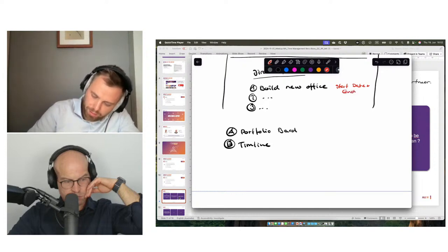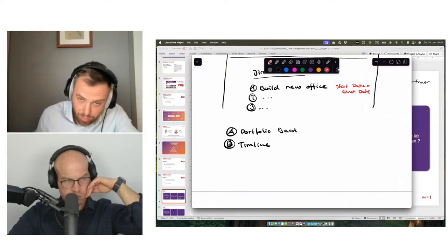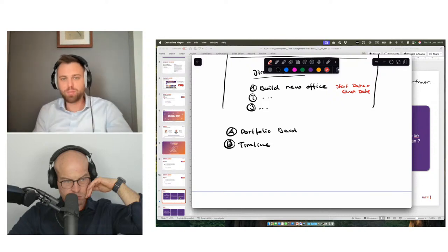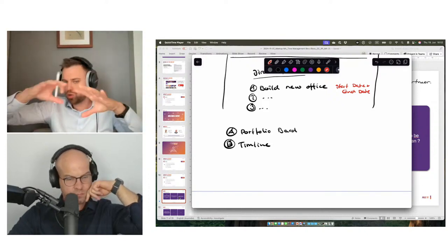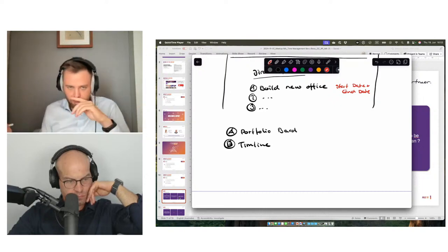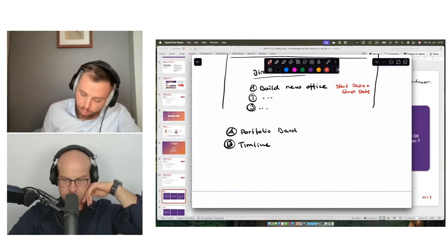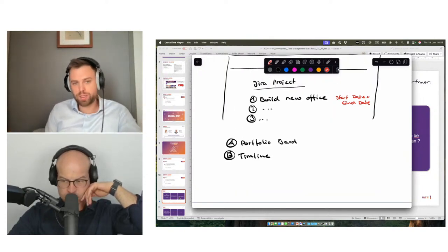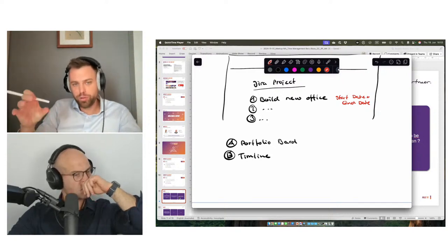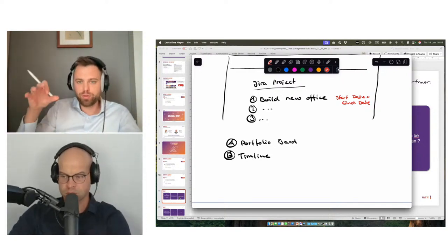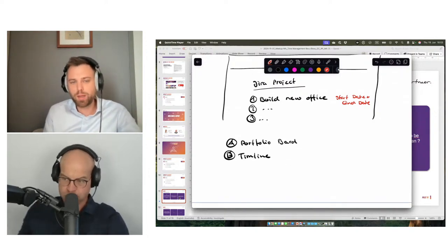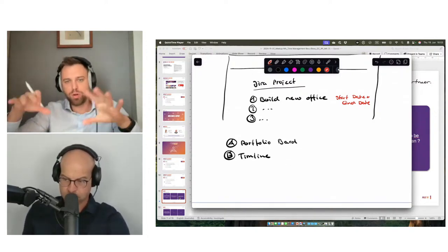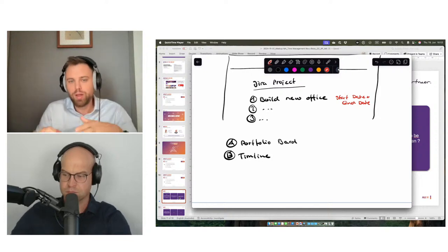And that makes it possible to assign that date, obviously, to show it on a timeline, which is pretty cool because you now have your projects on your board, not too many details. You see your whole portfolio, but the important thing is that you must set up every new project as a specific Jira project. So you cannot have one big Jira project where you put all your stuff in. You need to separate them to display it.